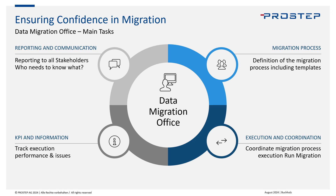On the lower left, you find KPIs and information. We want to track how a currently executing migration performs, take the KPIs, and log any issues. Furthermore, decide where those issues need to be raised. For example, an issue concerning source system data needs to be fixed in the source system and communicated to stakeholders responsible for it. An issue for the target system is forwarded to target system owners. Anything affecting the migration pipeline itself is handled by the pipeline team. Coordinating and reporting on the current status of those issues is one of the main topics for the data migration office.